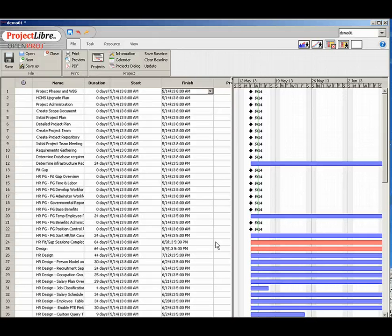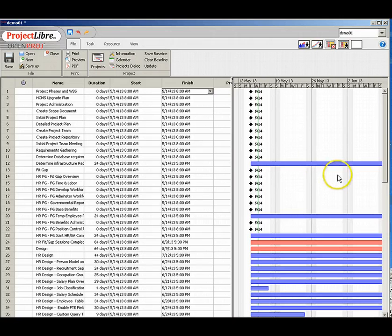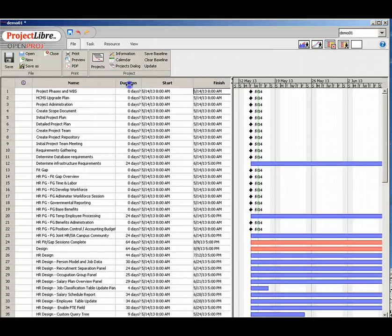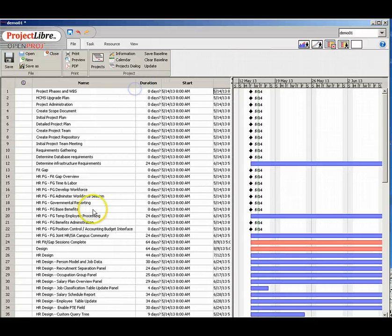Now we're ready to begin working strictly in project Libra, the project management software. One of the first steps is normally to take our work breakdown statements which have been separated by phases and actually use indentation techniques to break out the work breakdown statements within particular phase segments. And we'll do a couple of those here. The first thing we're going to do is open up the name column so you can fully see the phase and work breakdown with WBS naming.